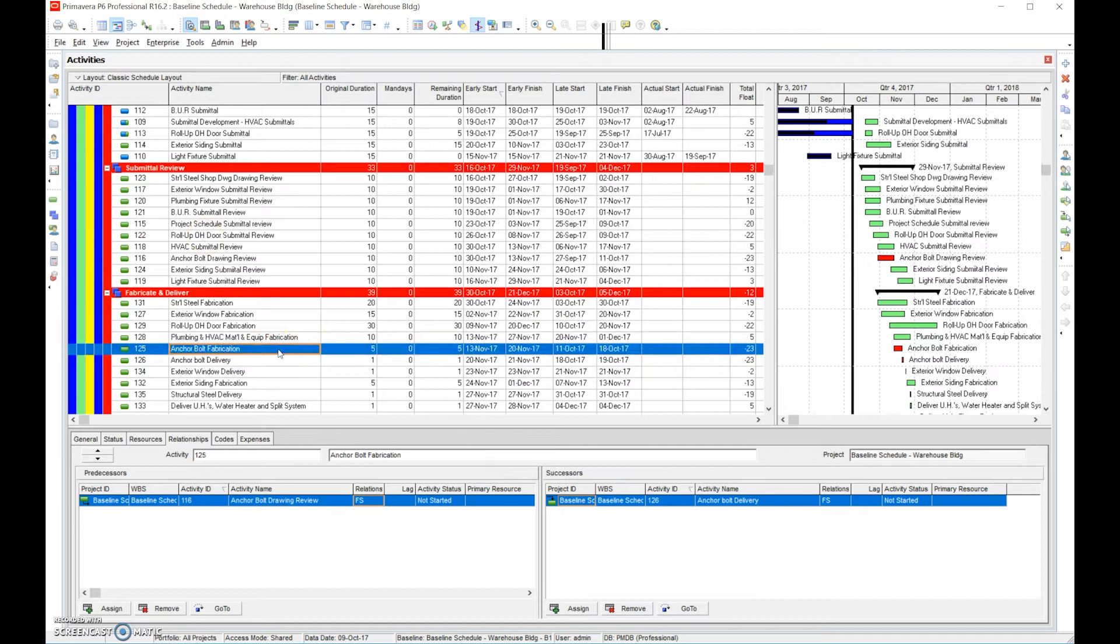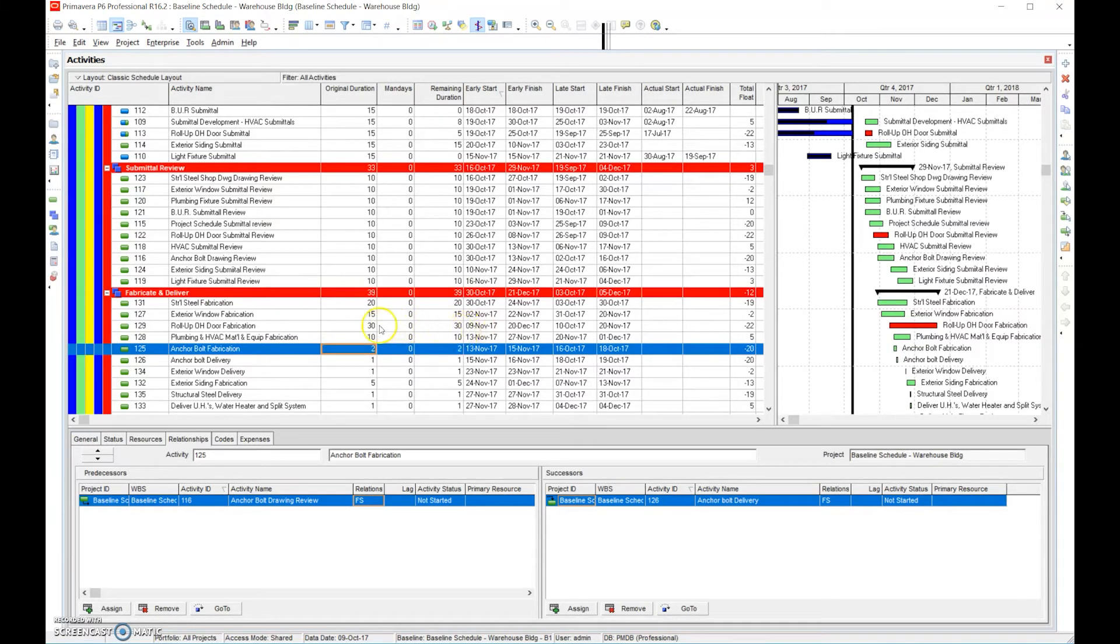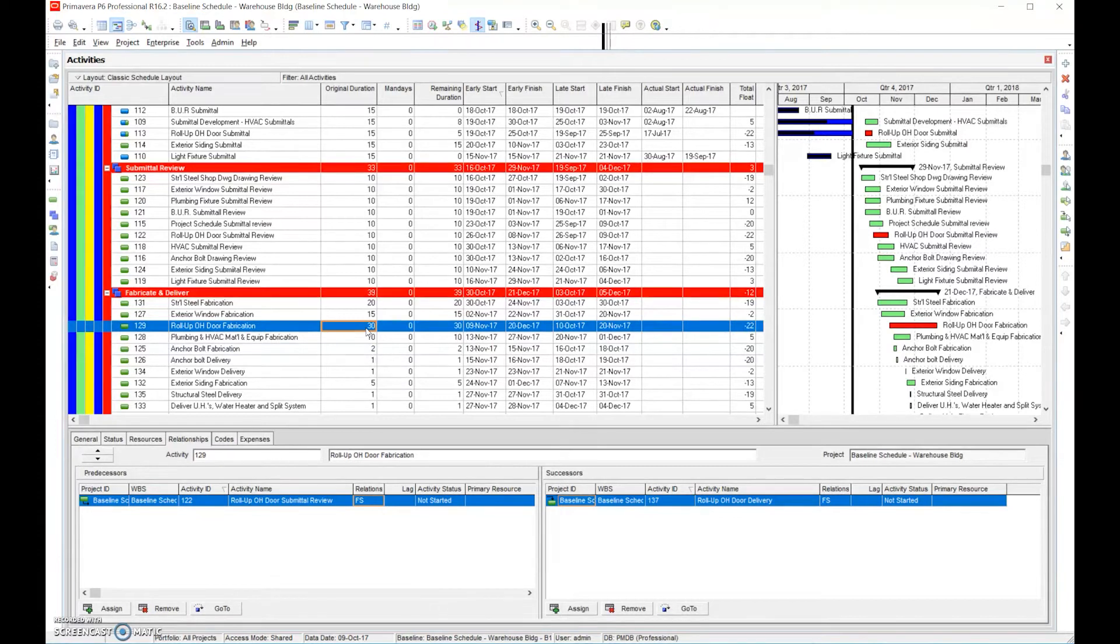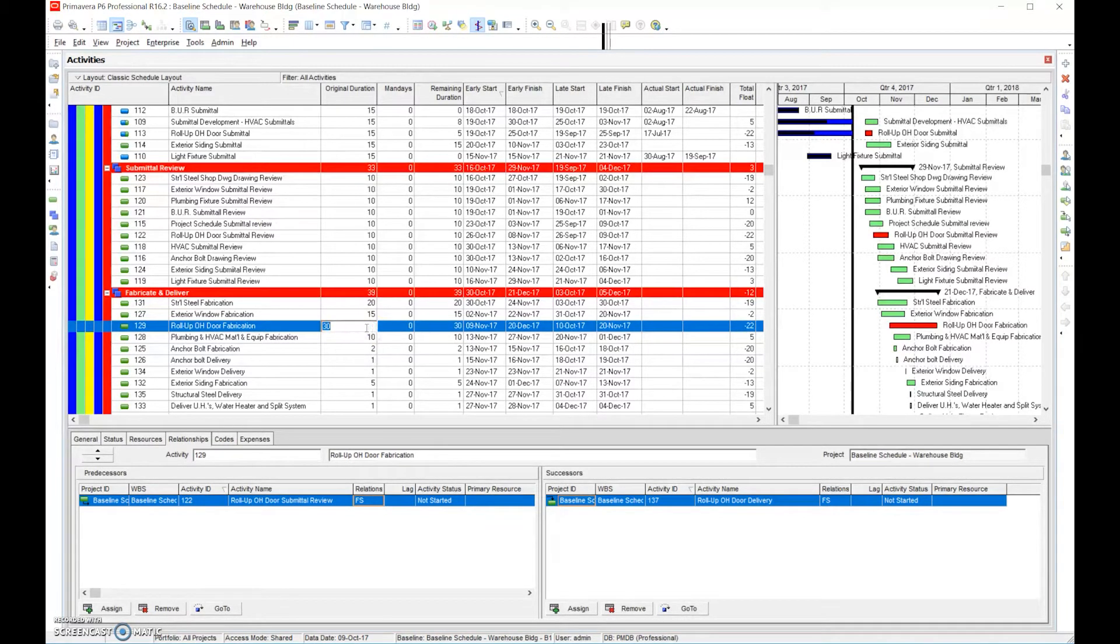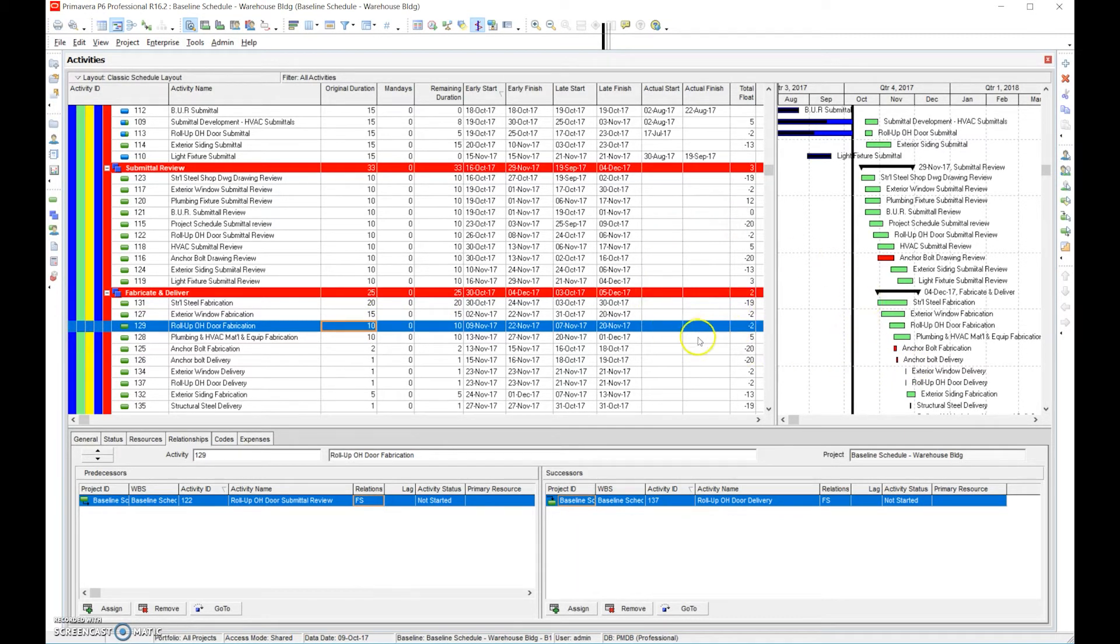And remember, we can't just arbitrarily do this. We actually have to talk with people. Maybe we talk to the fabrication people. Maybe we can get them the anchor bolts in two days instead of five days. We're not arbitrarily just changing that number. Now you can see the roll up door has a long lead time. They're saying 30 days. Maybe you talk with them and you pay them a little bit additional money and you're able to get it done say in 10 days. And you can see how the critical path changed.